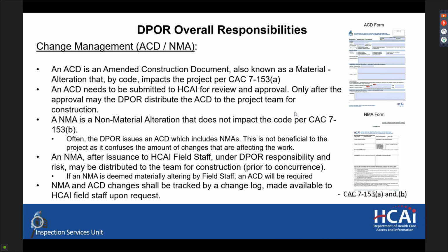that field staff can determine that something presented as an NMA is actually material altering, and then we will require that it be documented in an ACD, at which point the rules for ACDs will apply to that scope of work. So it is a small risk to try and move on NMAs prior to concurrence. The NMA and ACD changes shall be tracked by a change log, and this change log shall be made available to HCI field staff upon request.